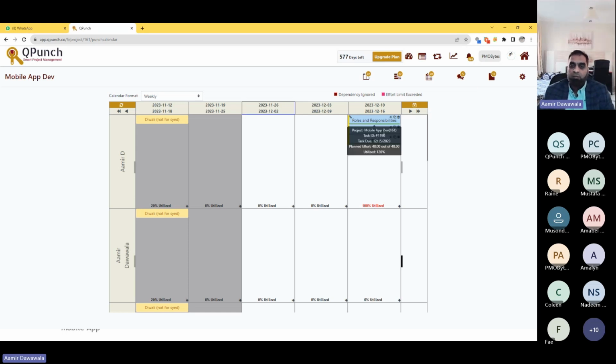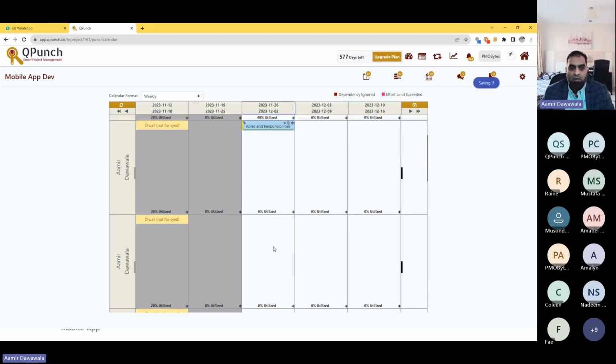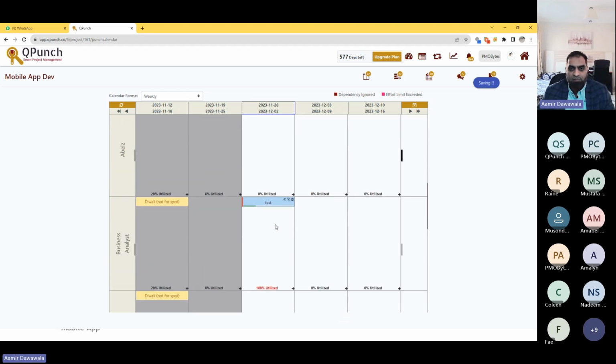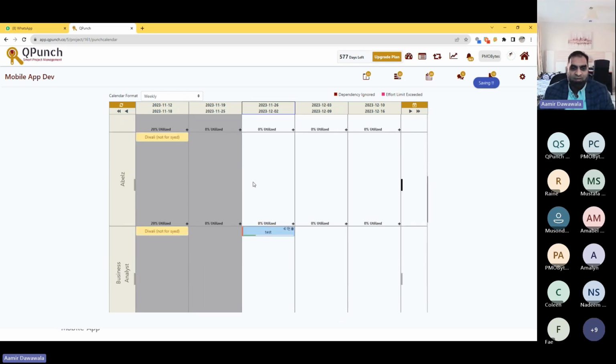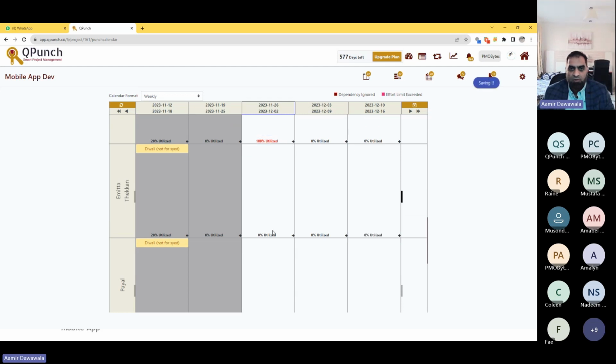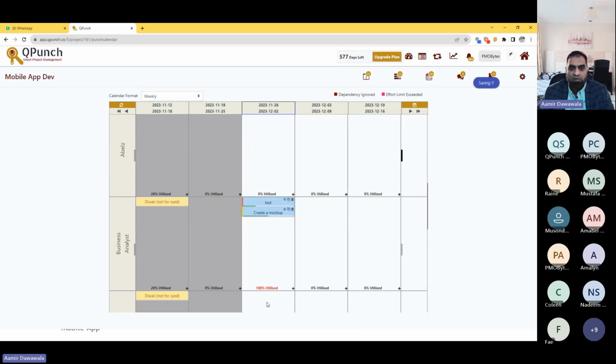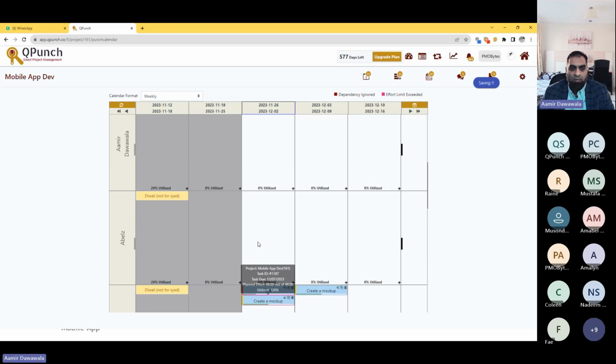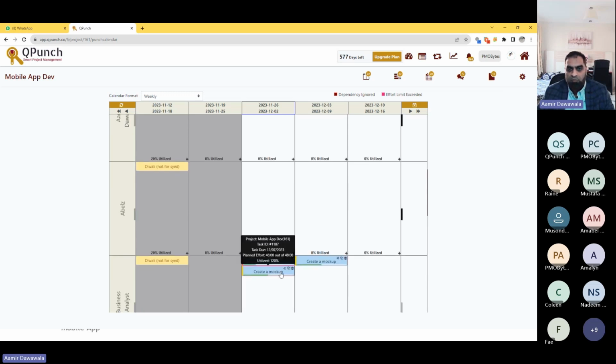So there are 2 ways to balance this out. Either I move the activity to where I am free, so I start early and move some activities, or I balance it out with another resource. So here it's myself again, but too many of myself. So suppose here between business analyst and, let's say, Abel, the business analyst has 2 activities at 100%. Now I want to balance the business analyst with Abel, so I'll move this activity here. So between the two, it's got balance.